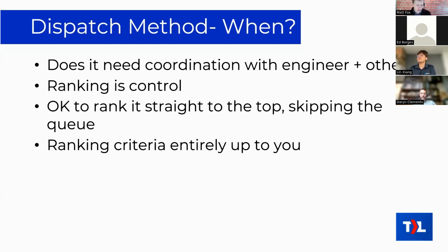And the reason it works is because engineers know that they work from the top of the list. So they get a queue, whether it's their own queue or a shared queue. They work from the top, whatever's always at the top of the list. Because when they take something, then there's going to be something else at the top of the list. So that is how they maintain the control, and that eliminates a lot of the disadvantages of the typical into-the-calendar dispatching method.